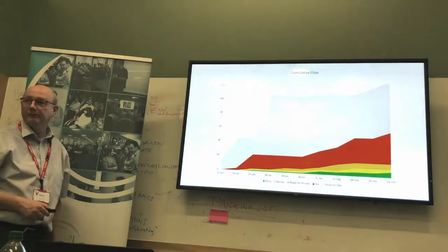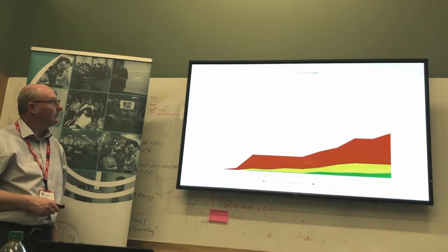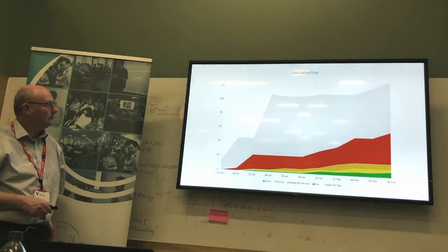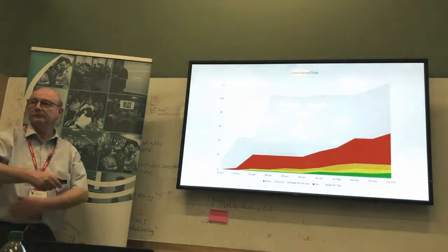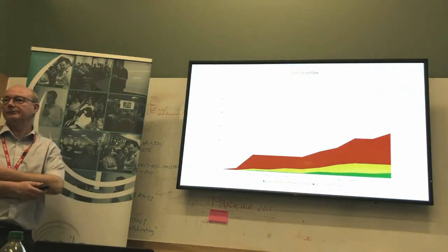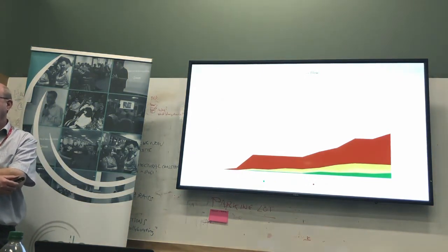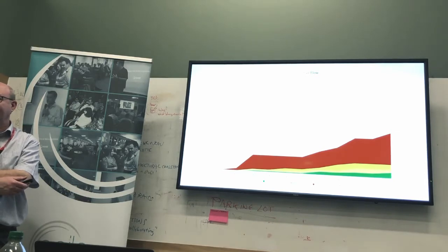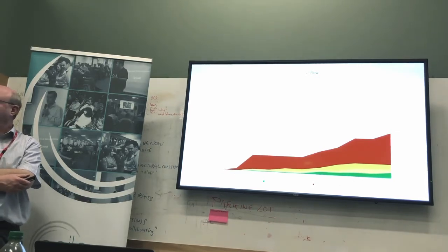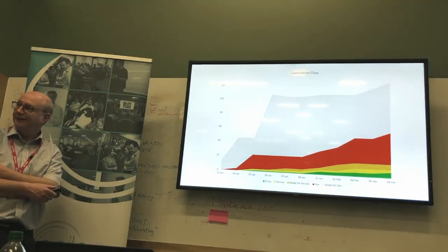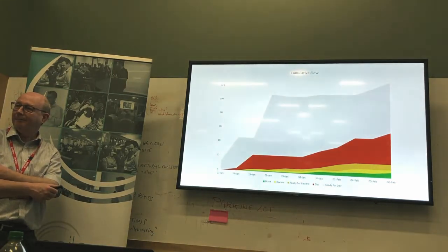I think you've got bigger dysfunctions than that, because if you look at the red, there's people picking up work before work's finishing. So it's not actually a team that's focused on either a sprint goal or an overall vision as to what we want to achieve in this sprint. If it's a small team, you could have people who are writing stories and people who have started working. They come off the writing and start picking up stories, they're just task shifting from writing stories into the work.